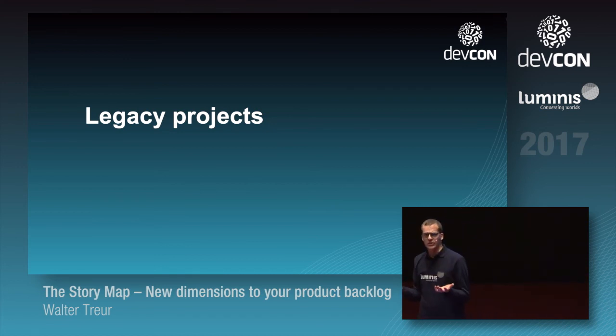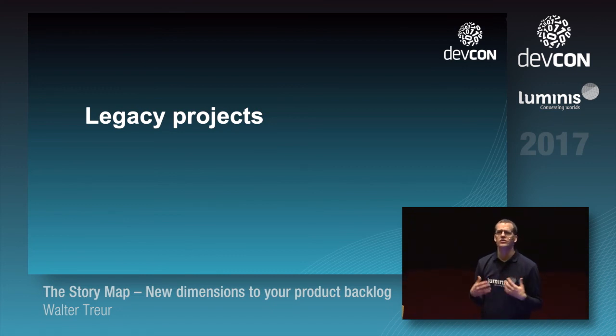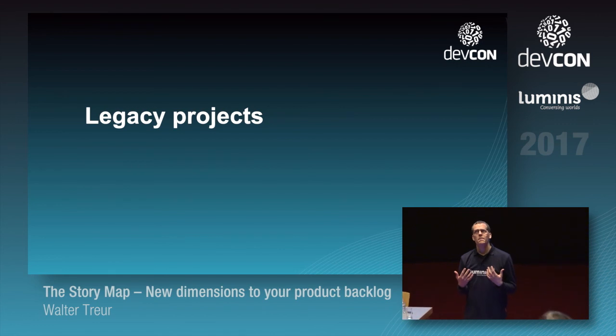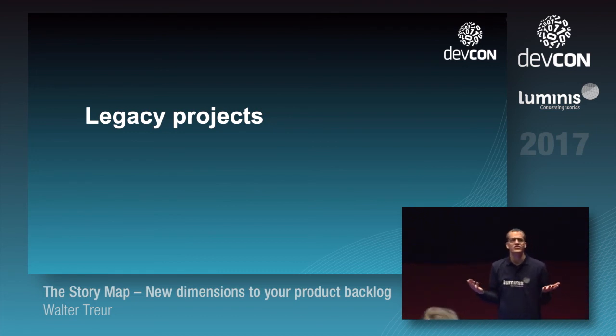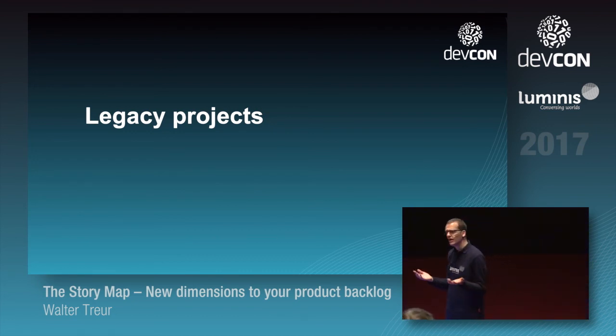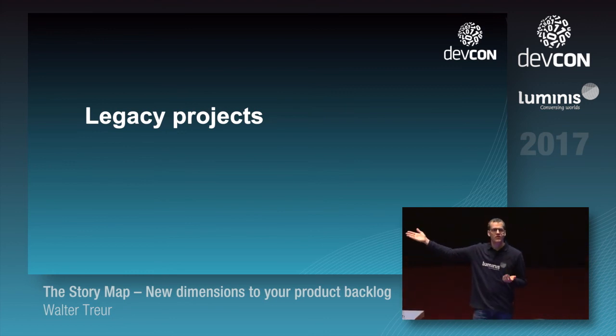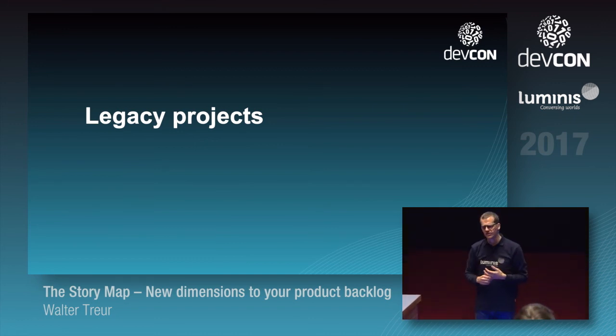The story map, if you want to use that in the beginning of the project, it usually makes sense to let at least the process of building it be owned by the product owner. But that doesn't mean that he has to do it all by himself. If he needs to, he can ask the expertise of a business owner or a technical person that can add some more details about whether or not this comes first or next.